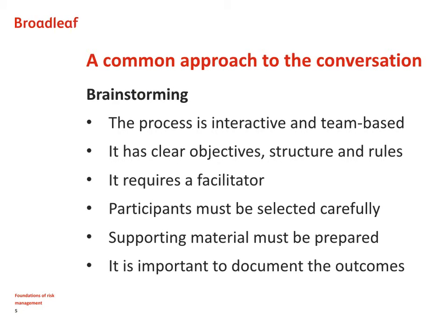There are some clear rules that have to be applied to make sure that brainstorming is effective. And generally, having a facilitator produces a very good outcome. It is important that participants for the exercise are carefully selected, and generally seniority isn't a condition for entry. It really is that the people concerned have an understanding of the subject matter and a degree of ownership of the outcome of the conversation.